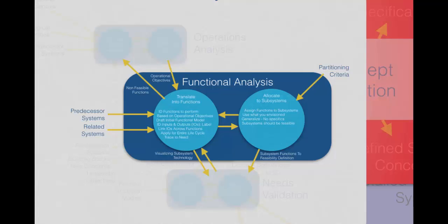If you're not an expert in the field for the system you're conceptualizing, you'll be required to conduct thorough market research and interviews to ensure the path you're following is realistic and feasible. When conducting functional analysis during the needs analysis phase, it's best to keep your functions at a high level. Decompose them only until you're confident that you have correctly identified either pre-existing technology or technology that will require engineering in order to perform these functions. The purpose here is not to dive deeply into how the system will actually operate, only to flush out high-risk technologies and feasibility for your system.